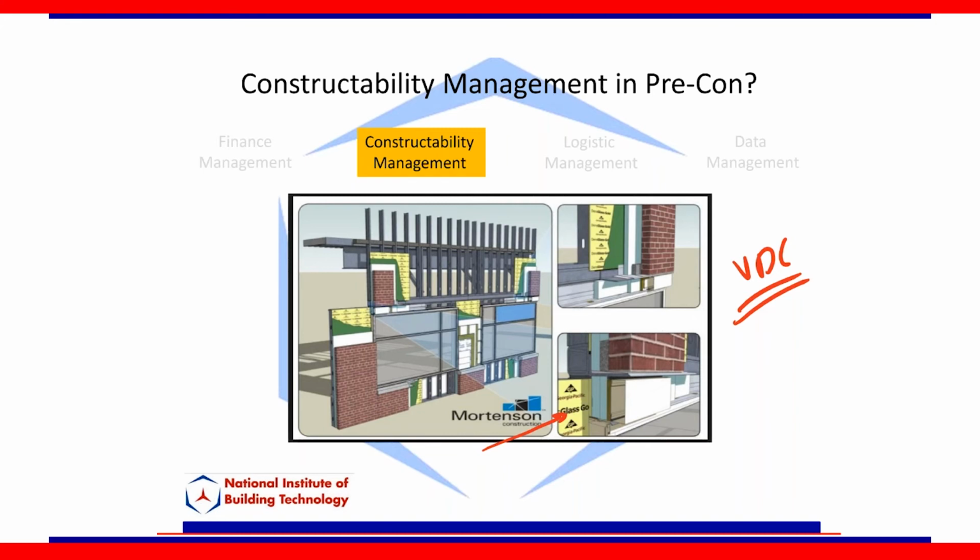Virtual design and construction is where you see a critical element, waterproofing, or logistics planning. And what general contractors are doing is they might not do the full model. They might show a client how they want to develop their penetrations, how they're doing their waterproofing. So these are the specific details, and these tools are given to the teams in the field. And guess what? They don't make mistakes, because they have a real representation of step 1, step 2, step 3, what goes in first, what goes second, everything laid down for them. So virtual mockups